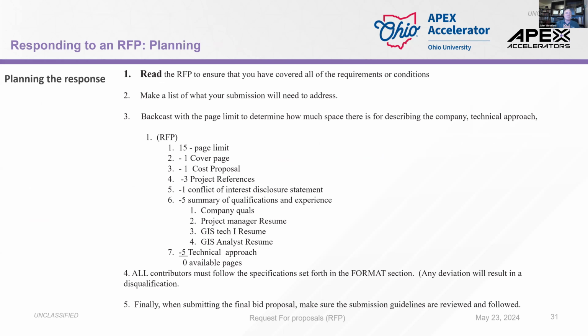So how do you plan your response? You read. I can't emphasize that enough. You make a list of what your submission will need to address. That's my note column. And then you backcast. You start from the point of finished and work your way backwards.